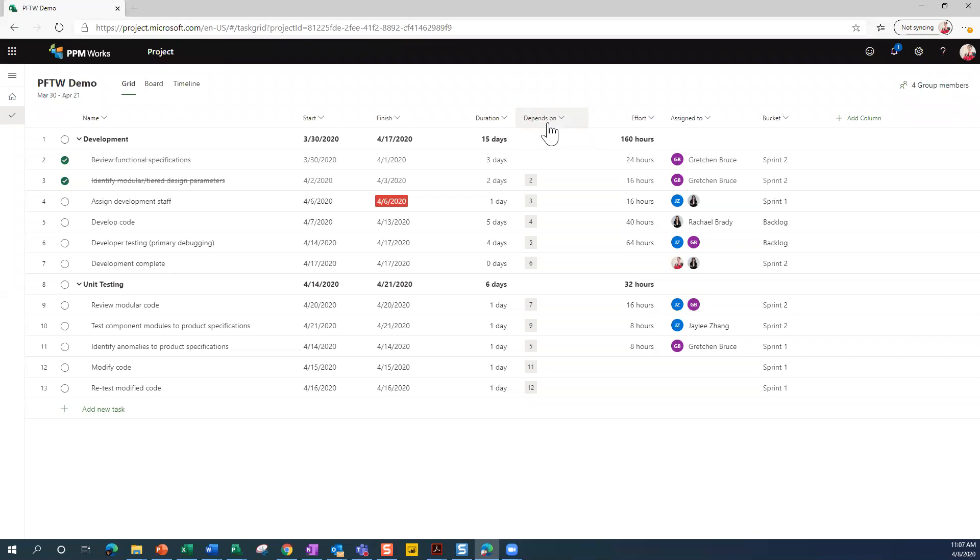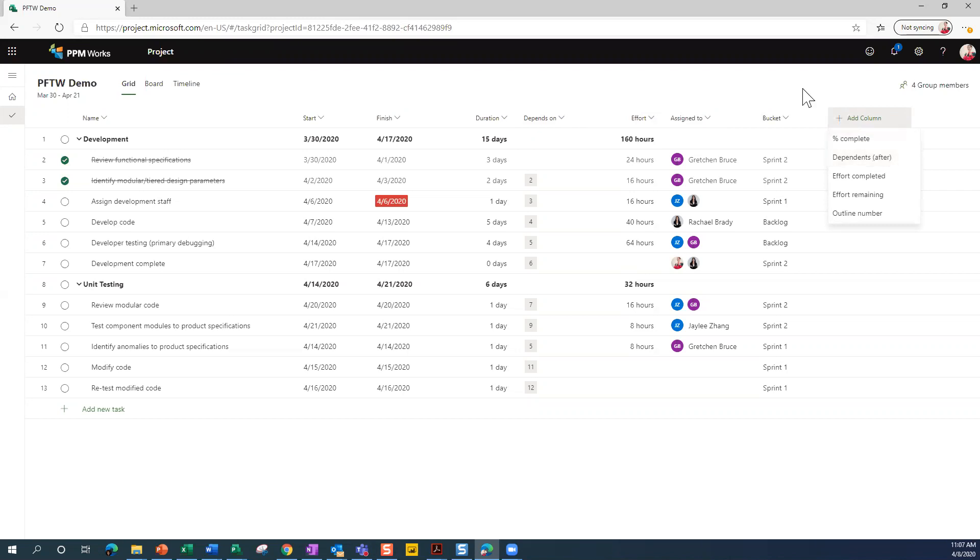There's also another field. If you come over here and click on Add Column, you can see Dependents. So that would be the equivalent of your successors in Microsoft Project.